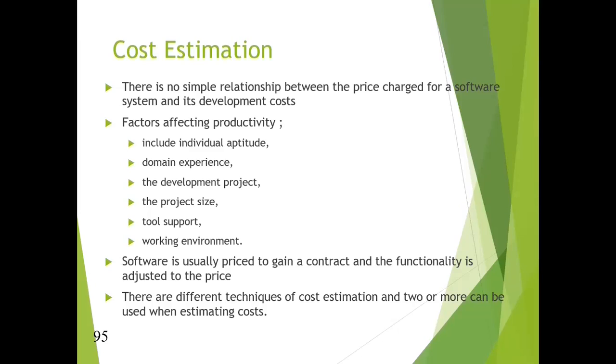You can calculate cost through labor. Labor means the cost of team members working on the project, both in terms of wages and time. And we can cost materials and equipment, the cost of resources required for the project, from physical tools to software to legal permits. Or we can cost facilities, the cost of using any workspace not owned by the organization, and vendors, the cost of hiring third-party vendors or contractors.